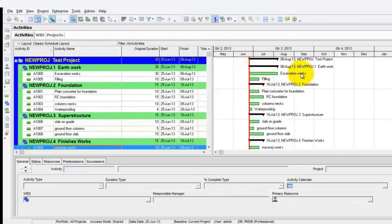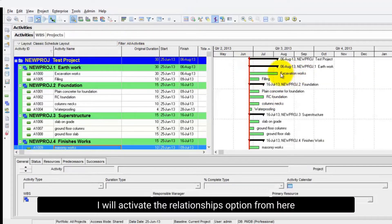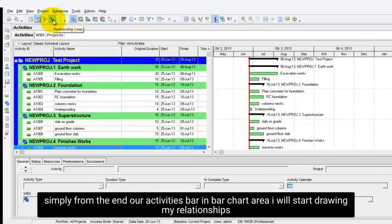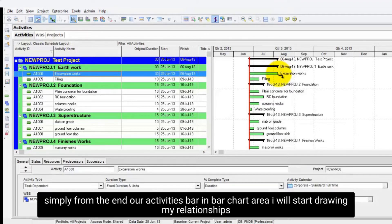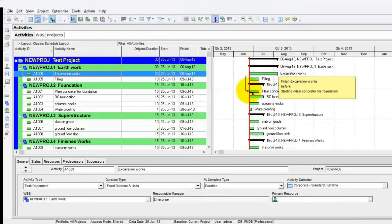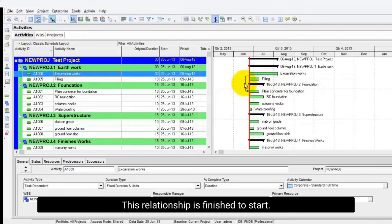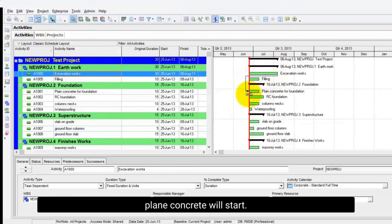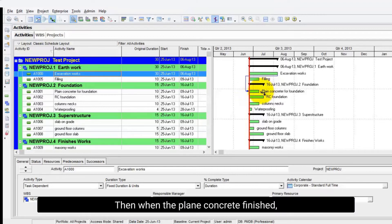This is our activity bar. I will activate the relationships option from here. Simply from the end of our activities bar and bar chart area, I will start drawing my relationships. This relationship is Finish-to-Start. After excavation finishes, plain concrete will start.